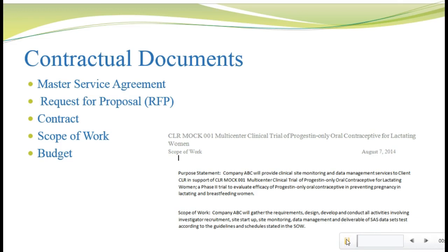As I noted earlier, in today's world we usually find ourselves working with vendors or sponsors rather than handling a trial entirely on our own within a company. This means we're going to have some contractual documents in place, and as a team member you need to know what those are and how they're used. Let's talk first about the need to document responsibility for a task. We can extend that concept to the contractual agreements between sponsors, sites, vendors, and CROs. These contract documents, along with the protocol, form the foundation for the scope of the project — the essential information is, again, who is responsible for doing what.